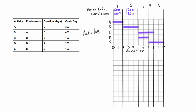In period three, activities C and D are both happening. C costs $400 per day and D costs $200 per day, so during this period we're spending a total of $600 per day. There are two days in period three, adding a period total of $1,200. Adding that to the cumulative gives us a cumulative project cost of $3,000 by the end of period three.